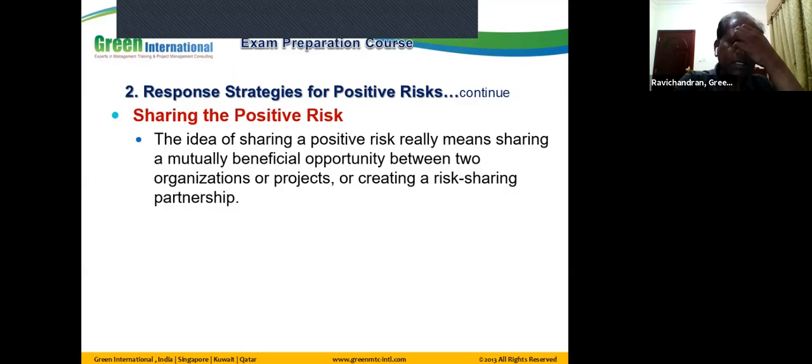But if they join together, say one company is having good experience in infrastructure, one company is having good experience in building construction, one company is having experience in MEP work, one company is having experience in the other infrastructure finishing work. So if they all join together, using all the companies' expertise, we will be able to complete the project on time. We will be able to make good profit. Everybody knows if we all combine together, we can make good profit. That's why we are going into the JV arrangements in the case of large projects. No single company tries to do these kinds of projects alone. This comes under risk sharing partnership.